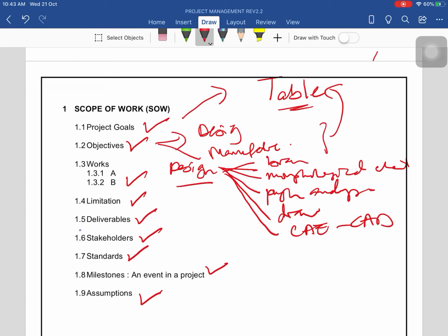These are the activities involved in the design part, whereas manufacturing also involves much more activities. These activities have to be listed down systematically with numbering so that it shows the cascading effect of activities, at what level it goes, and you want to declare all the details up to the lowest granularity, the lowest detail.